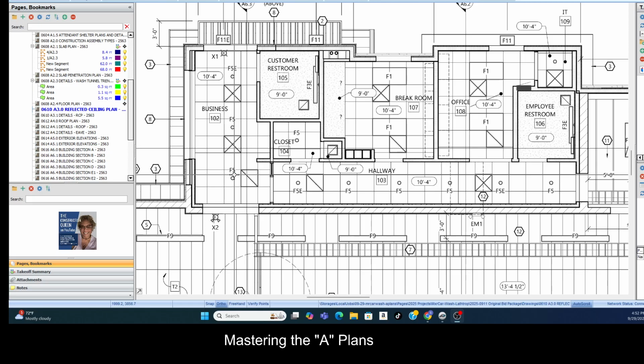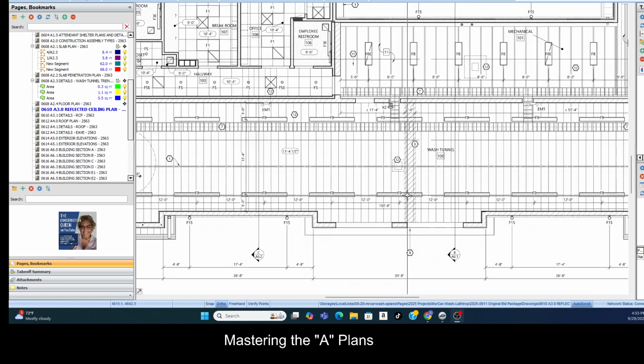So it's not for the HVAC professional. It's not for the lighting electrician. It's not for any of them. It's strictly for the finish trades so they can see and determine how many square feet of ACT or JIP, or for the painter for sure, how much ceiling needs to be painted, what needs to be painted on the ceiling. So we take our measurements here and then we go to the finish schedule to determine which room gets what color, is the wall painted all the way up to 10 feet or whatever, or is there even paint on it at all.